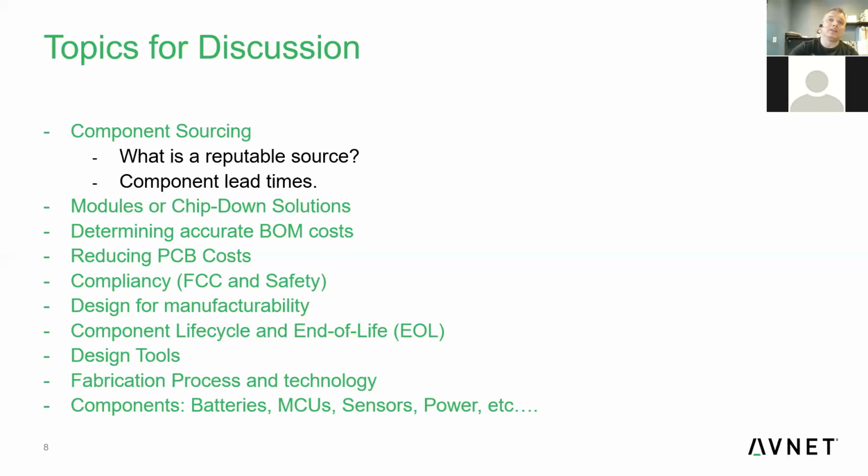And the thing with displays, if you're using one, is that second sourcing displays is very difficult. They don't tend to have common form factors. They tend to be a little bit specialized, and characterization tends to be very specific to the product. So they're very tough to find somebody else that makes the exact same thing. They had themselves in a very difficult situation, trying to very quickly switch to another manufacturer, to another display, and that was going to impact their overall product design just as they were going to move into production. So it's one of those things you've got to watch.